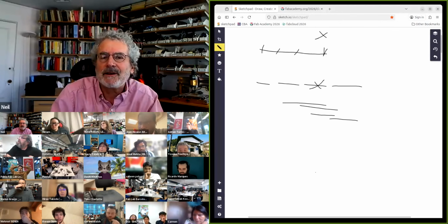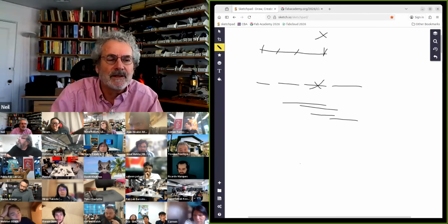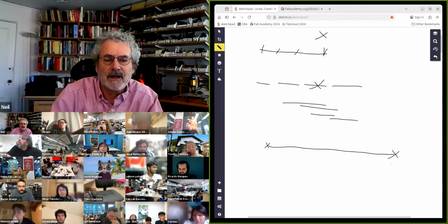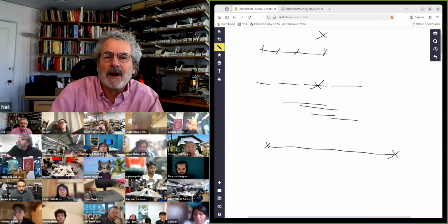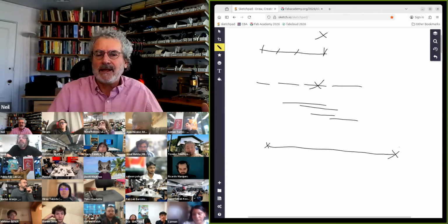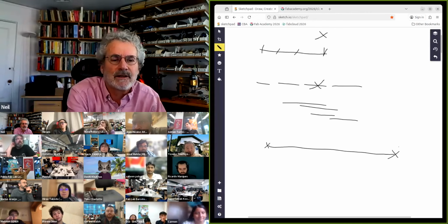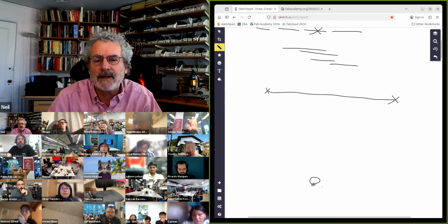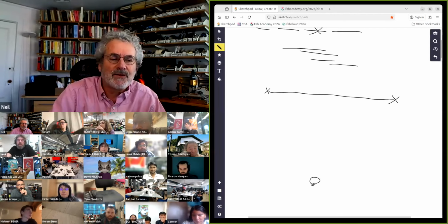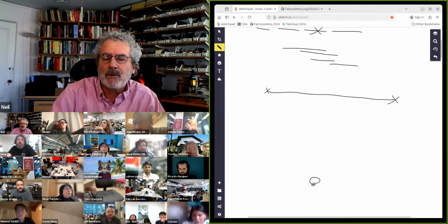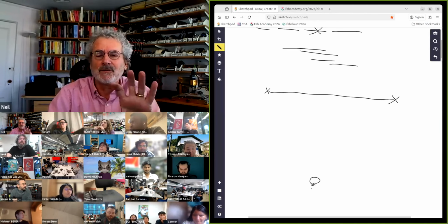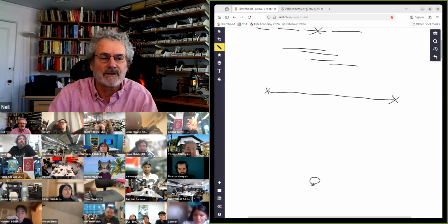So a big one you'll get tired of hearing me talk about is spiral development. Linear development is you start here, you work to the end, and then you're done. And there have been large government projects where you spend 10 years and $1 billion and it doesn't work. Spiral development is you work in loops. So let's say you want to make a delivery robot. The first version might just be a cardboard prototype. And so you make a full size, a little version of the robot out of cardboard to see how it looks.